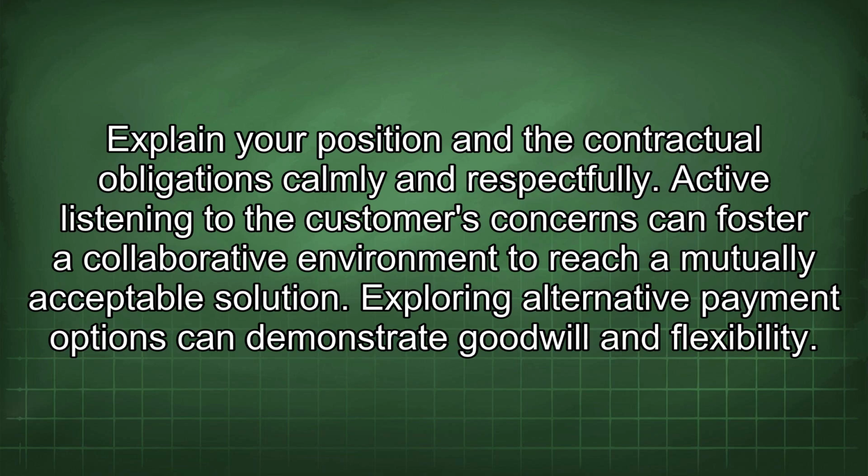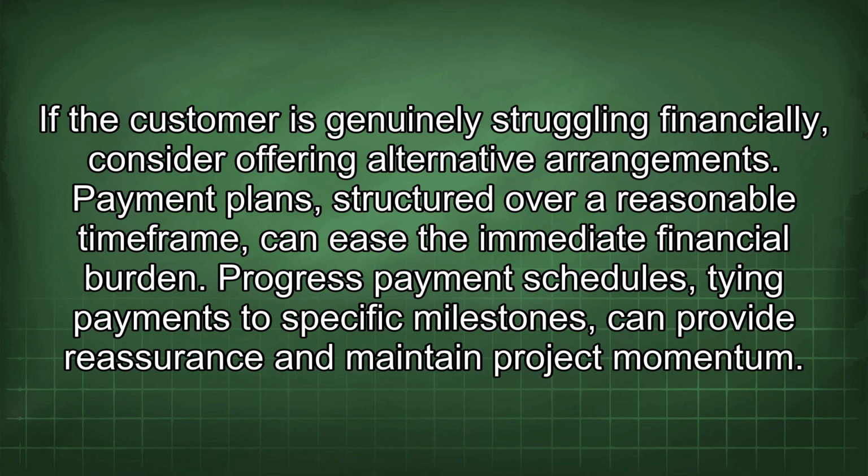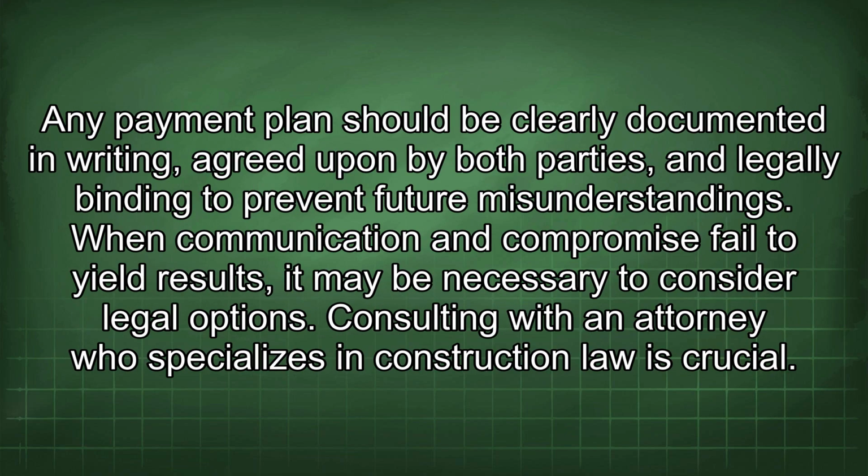Exploring alternative payment options can demonstrate goodwill and flexibility. If the customer is genuinely struggling financially, consider offering alternative arrangements. Payment plans structured over a reasonable time frame can ease the immediate financial burden. Progress payment schedules tying payments to specific milestones can provide reassurance and maintain project momentum. Any payment plan should be clearly documented in writing, agreed upon by both parties, and legally binding to prevent future misunderstandings. When communication and compromise fail to yield results, it may be necessary to consider legal options.